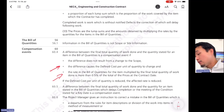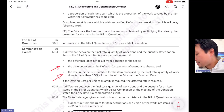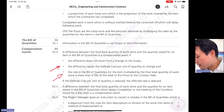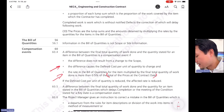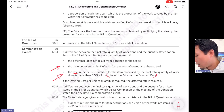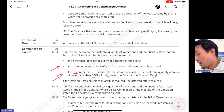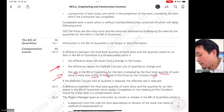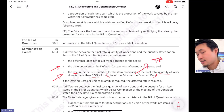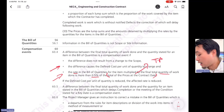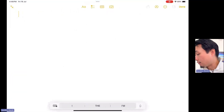The third criterion: the rate in the bill of quantities for the item multiplied by the final total quantity of work done must be more than 0.5% of the total of the prices at the contract date — that is, more than 0.5% of the tender price.